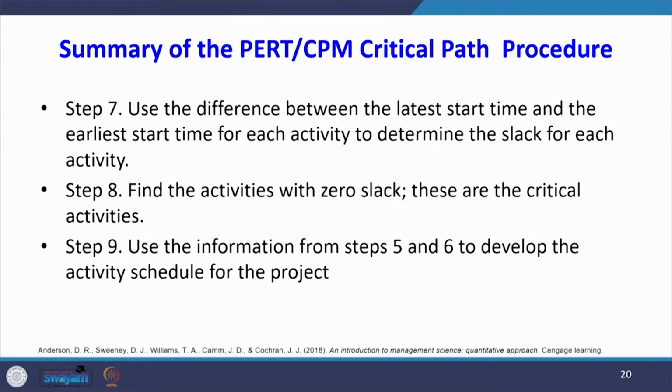Step 7, use the difference between latest start time and the earliest start time for each activity to determine the slack for each activity. What is step 8? Find the activities with 0 slack. So, these are the critical activities.